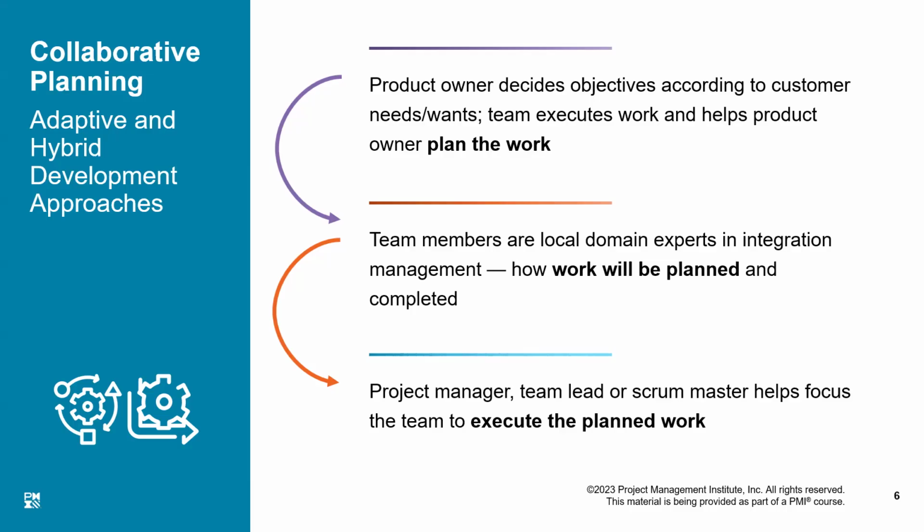Product backlog is the place where all the requirements are continuously being added, right? Then we prioritize those requirements, and for each iteration, we pick the topmost items as per our capacity.